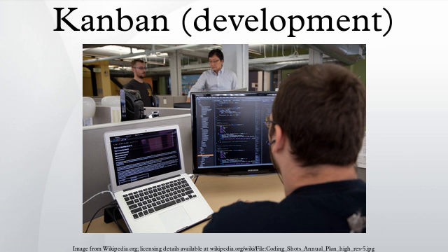Limit WIP. Limiting work in process implies that a pull system is implemented on parts or all of the workflow. The pull system acts as one of the main stimuli for continuous, incremental and evolutionary changes to the system. The pull system can be implemented as a Kanban system, a ConWIP system, a DBR system, or some other variant. The critical elements are that work in process at each state in the workflow is limited and that new work is pulled either into the new information discovery activity when there is available capacity within the local WIP limit. Manage flow. Each transition between states in the workflow is monitored, measured and reported.